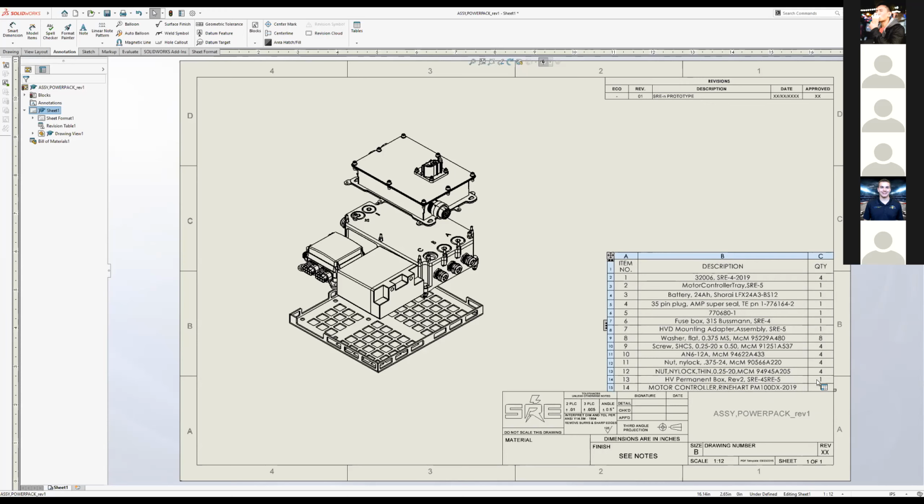Usually they'll see that instantly, but sometimes it's little things here and there, where there's a long electrical lead that's a long lead time item, and they can't procure it, and you have the wrong quantity, and then that brings a bunch of errors. There's also obsolescence parts that aren't used that you'll have to make a revision for, or pay a huge premium to get that thing made. So just keep that in mind.